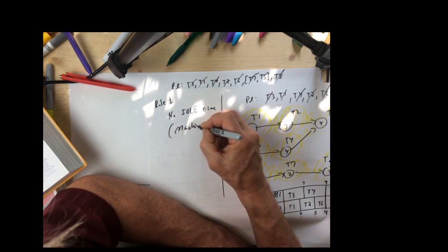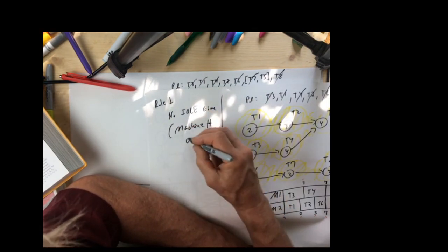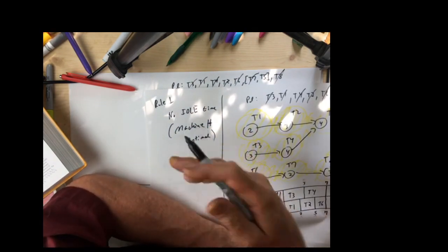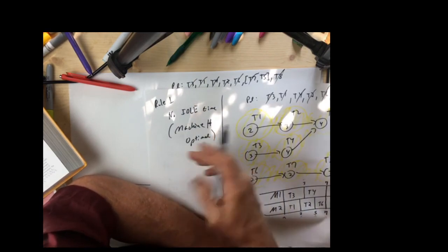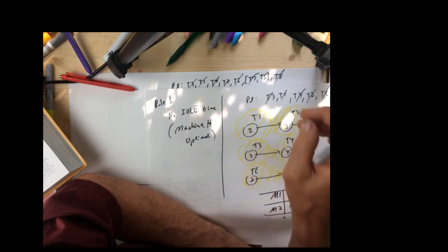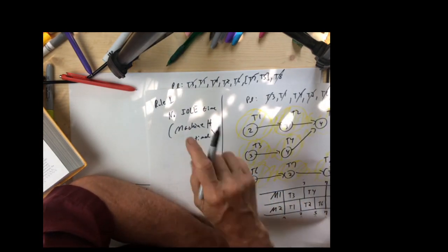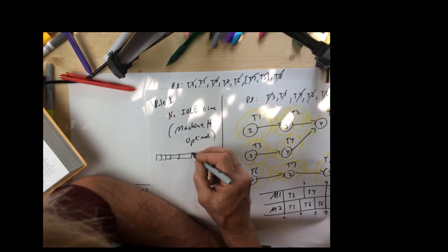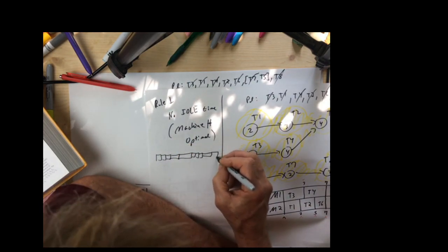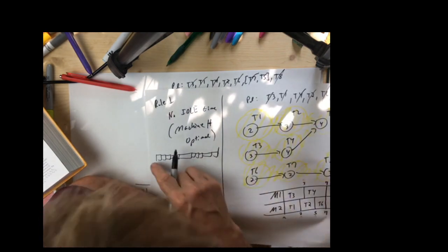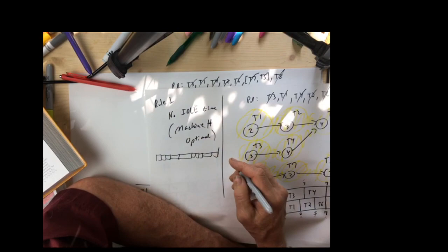Then this is machine optimal. What does that mean? It means for the machines that you've put in, if there's no idle time, it's optimal. It may be possible to do it faster globally. This is a local optimal. Think, for example, of one machine running all the time, doing some jobs, and it finishes. There's no downtime, no idle, because it doesn't wait. That's, quote, a machine optimal schedule.